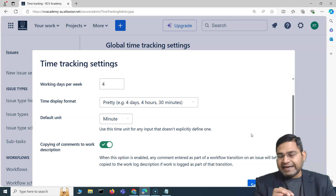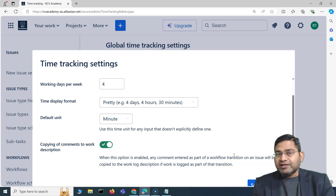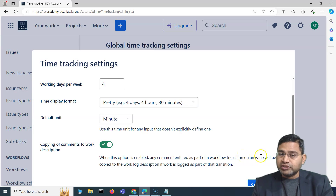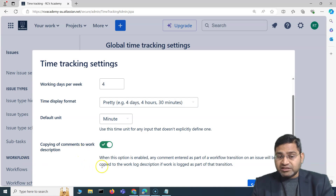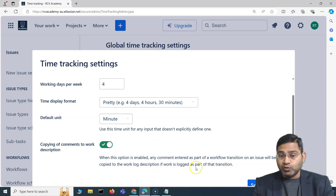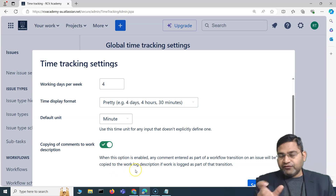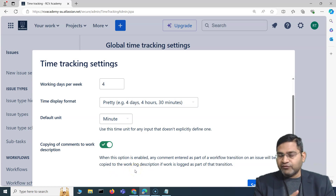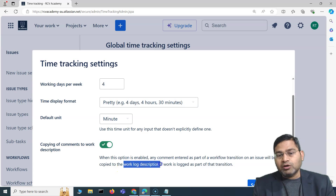If this option is enabled and someone enters a comment in that transition pop-up and moves the issue to Done, that comment will be copied to the work log description — but only if work is also being logged as part of that transition. So if the person logs time and enters a comment during the transition, that comment gets copied to the work log description.